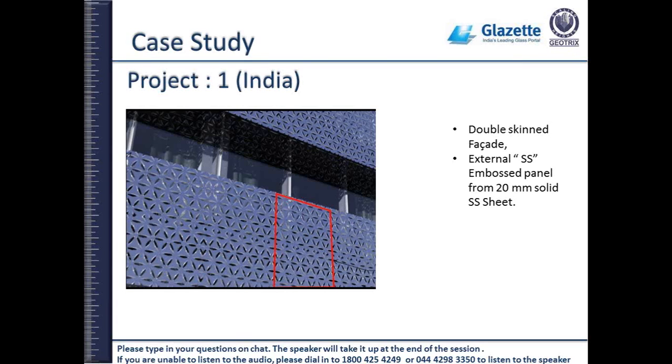But today, if I take the example of a building which needs to be done in 2 years, our pre-planning in India is 1 year plus, or say 14 months on the drawing board, where we go back and forth, with government approval and everything. So 1 year gone, we are left with hardly 10 months. Then everything will be rushed. And worst of all, the facade contractor will be engaged in the last 4 months.